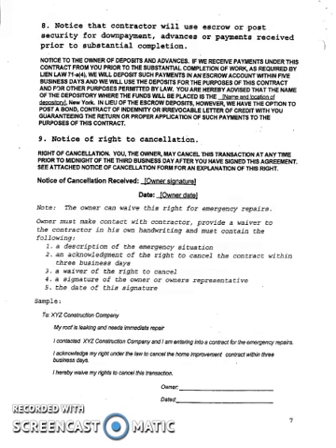Number 9 is the notice of the right of cancellation. So the owner has the right to cancel the contract after they have already signed it. And the time frame on that is prior to midnight of the 3rd business day after the agreement has been signed. So even though the owner has signed this contract, you've signed this contract, technically it is an official document at that point. It's enforceable by law. They have up to 3 business days to cancel that contract. That's important to know.